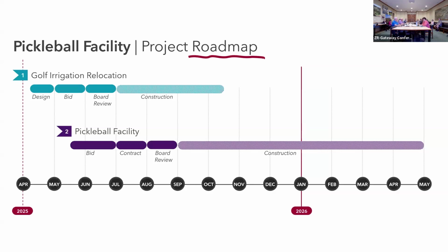We went through and looked at all the things you would have to do in a more complicated relocation. And if we had a cutover, which is moving from the old system to the new system, that was more than a couple of days, like a couple of weeks, so we did a worst case scenario for that. And again, we're going to know that better by the beginning of July. We'll be able to adjust that in July.